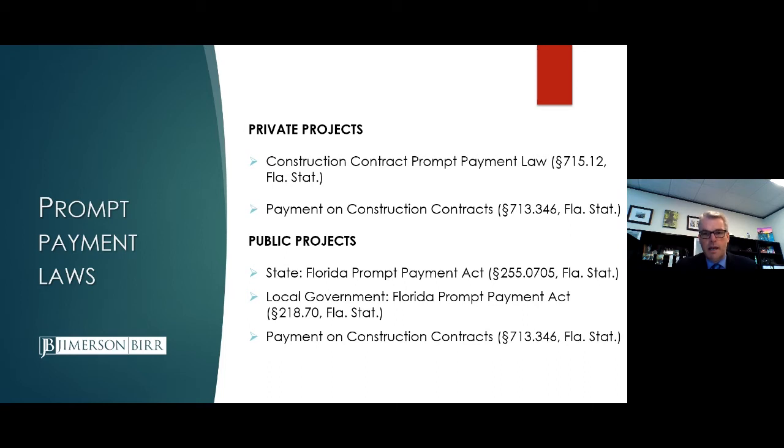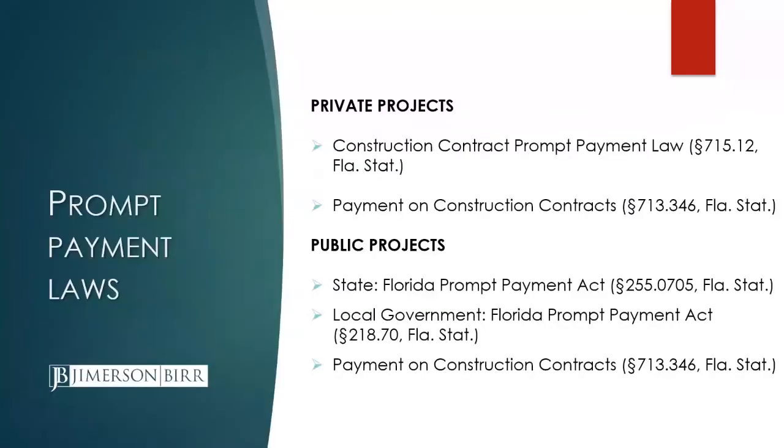Keep in mind that there is a Prompt Payment Act governing certain types of government projects. There's also one that governs local government projects, and you'll just need to either consult counsel or take a look at the statute to understand which statute you're traveling under if you are working on a public project. But at the end of the day, the payment and remedy component of the public prompt payment statute is very similar to what the private project remedy provides. Again, the speedy hearing and other types of relief.